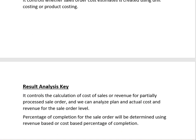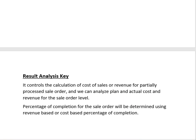For example, if our total planned cost is 100 rupees but we have consumed only 30 rupees, our percentage of completion for this sale order is 30 percent. For the revenue-based method, if the sale order is for 100 rupees and we have received 20 rupees from the customer so far, our percentage of completion is 20 percent. This is how we check how much percentage of completion a sale order has covered, and then analyze the plan and actual costs and revenues.